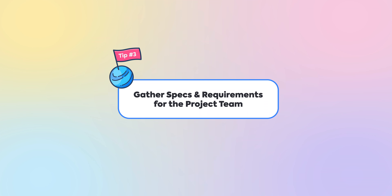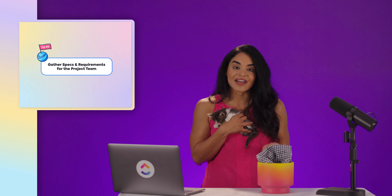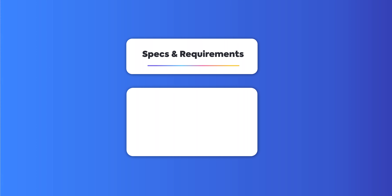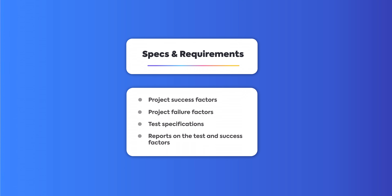Number three: gather specs and requirements for the project team. The next step in your project management checklist is to gather the specifications and requirements for your project. This will depend on the type of project you're working on. In general, your specs and requirements should include result-oriented criteria like project success factors, project failure factors, test specifications, and reports on the test and success factors.